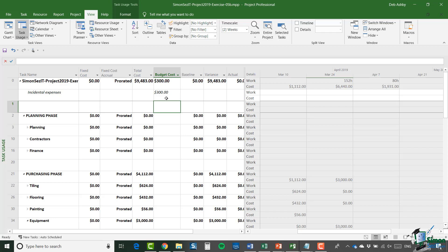As you'll see later when we start tracking costs, I'll also need to manually track this cost — so if at the end of the first month I've spent $127, I'll need to show that I've spent $127 of that $300. But that's how to set up a budget cost on a project. As far as cost goes, that's certainly enough to get us started and build up a good cost profile. That's the end of this section — I'll see you in the next one.